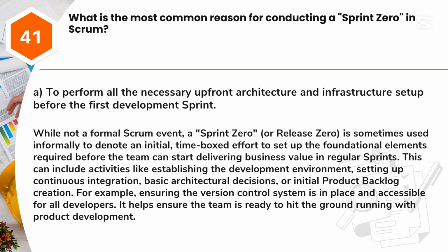This can include activities like establishing the development environment, setting up continuous integration, basic architectural decisions, or initial product backlog creation. For example, ensuring the version control system is in place and accessible for all developers. It helps ensure the team is ready to hit the ground running with product development.